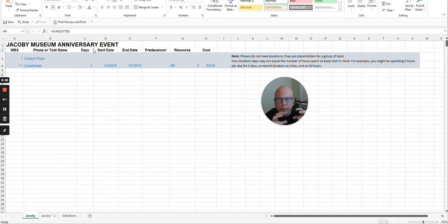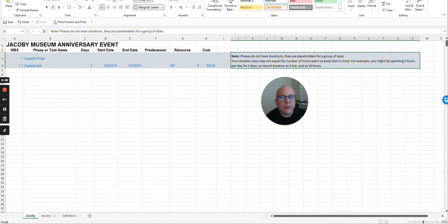Well, the phase, actually, you do have your overall time it takes to do phase 1 from start to finish, phase 2, phase 3, etc. But it's kind of a bottom-up kind of thing. In one of 2 ways. So when you're doing a phase duration, you can set a hard date to say this is our due date, like our event in this example. We have to hit the Friday, second Friday, and then that second Saturday in September. So that's going to be a hard stop, and then we got to back everything in to fit that.